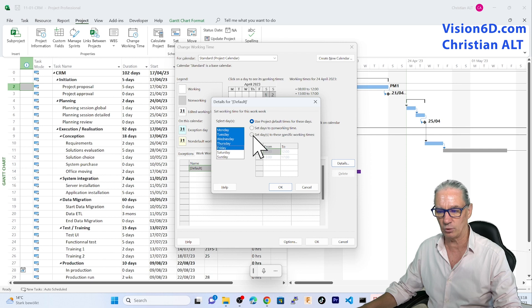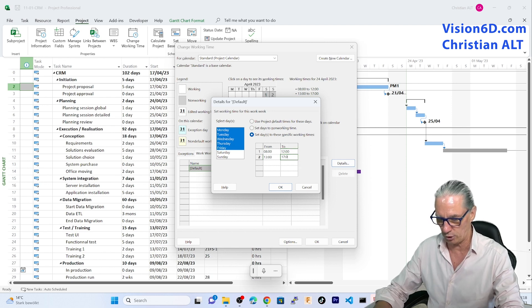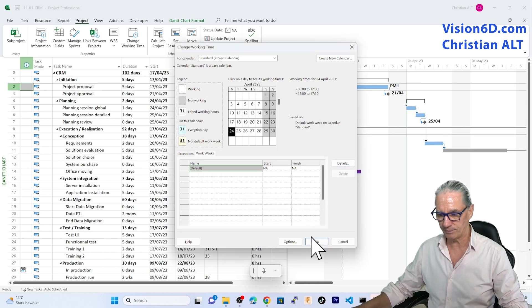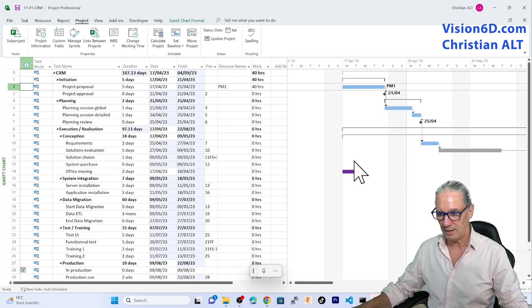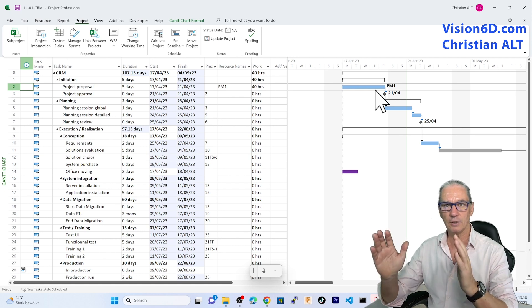I'm going to select Monday through Friday and choose the option that says 'set days to these specific working times.' My change is really simple since I'm going to prolong by half an hour the work during that day. I click OK, OK again, and you might have noticed that the task bar here has become a bit shorter.